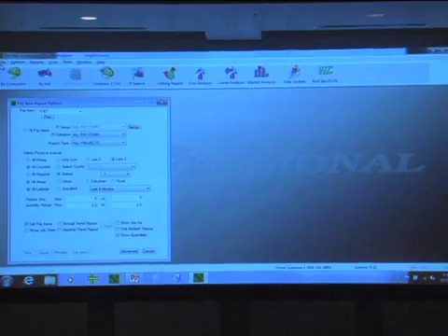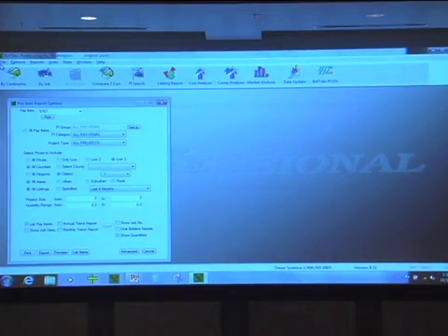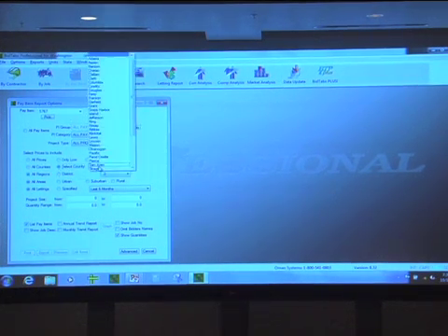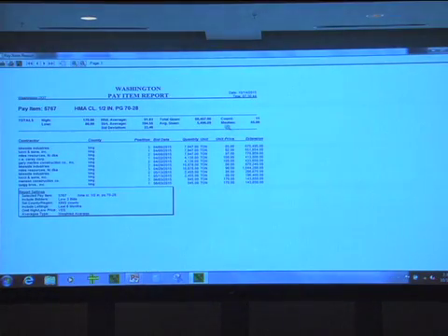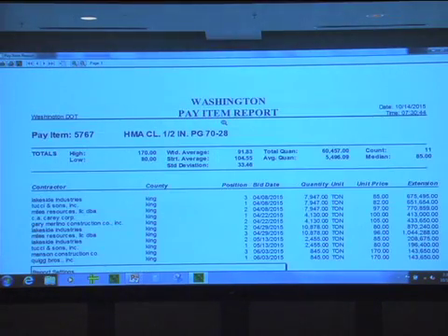But Seattle is actually in King County, which is our largest county, which does a lot of work and influences prices quite a bit. It's very, very urban. So I'm going to select King County and see what's happening there. So I've selected King County, and I preview that. That shot it up to $91 a ton. So that's quite a bit of difference.